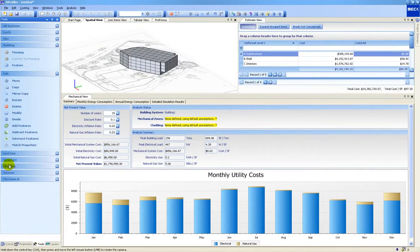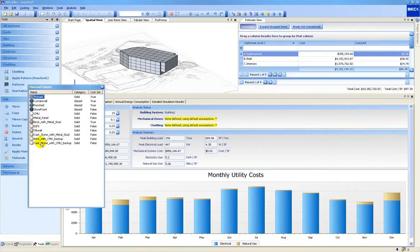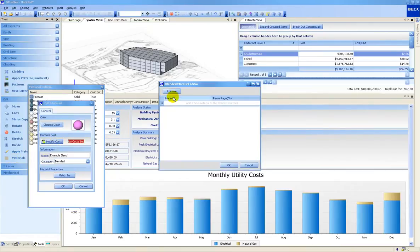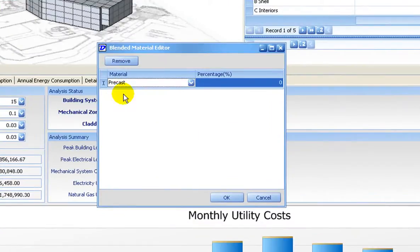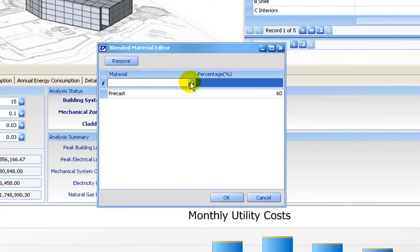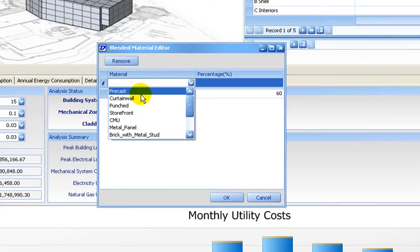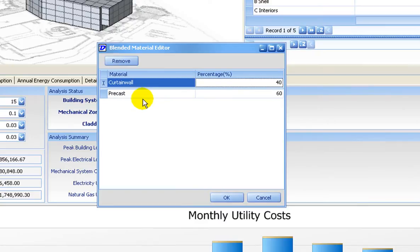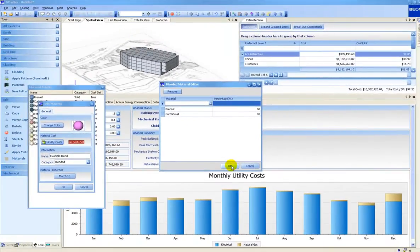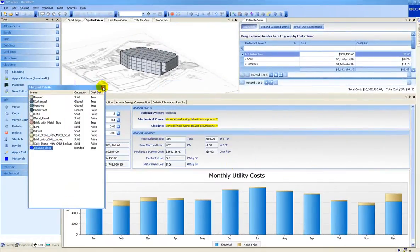Another aspect of dProfiler is its energy analysis capability. Based on the Department of Energy's DOE II standard, this conceptual analysis is used to evaluate energy costs in the early stages. For example, different cladding conditions such as glass type or percentage of glazing can be analyzed to quickly determine the first cost and operating cost of each option.